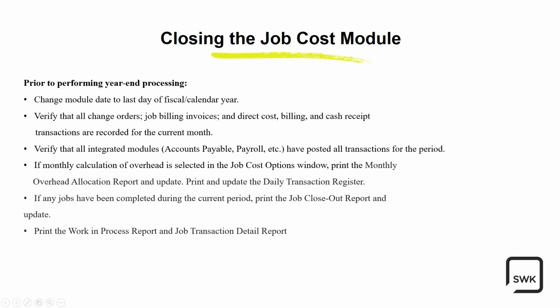It's going to slowly load. For job cost, prior to performing the period end, we basically do the same thing. We verify that all change orders, job billing invoices, and direct costs, billing and cash receipts are recorded.